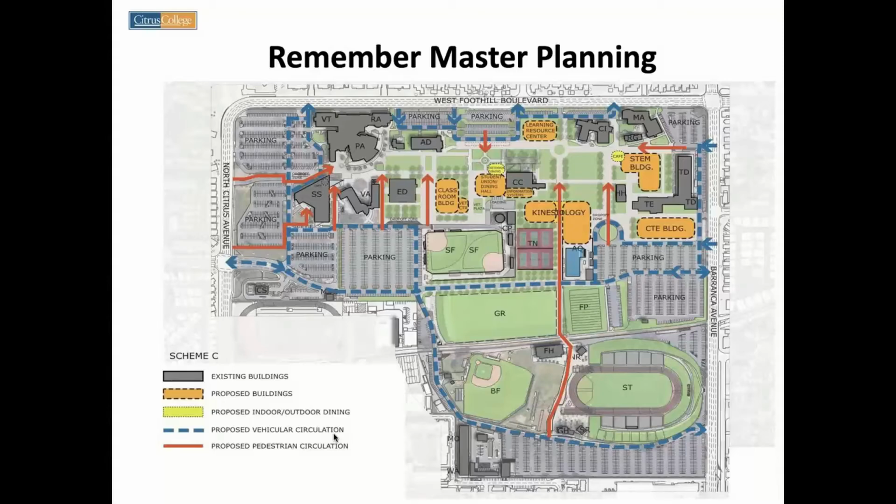So with that being said, CTE was presented to the Physical Resources Committee as being priority number 1. Next one up would be the STEM building. With the STEM building going in, again, that one is where 2 other buildings are actually located that house folks that would be in the new CTE building.